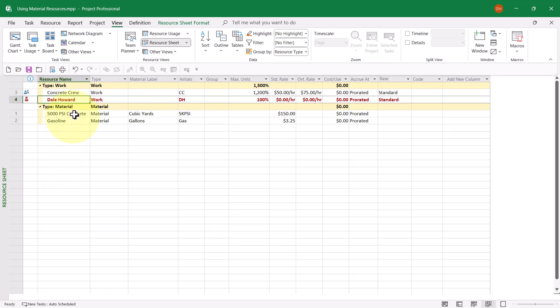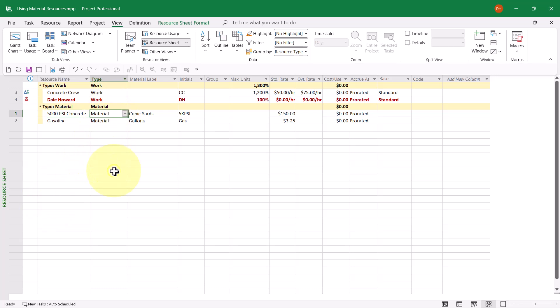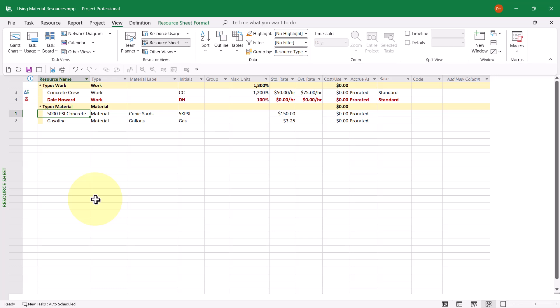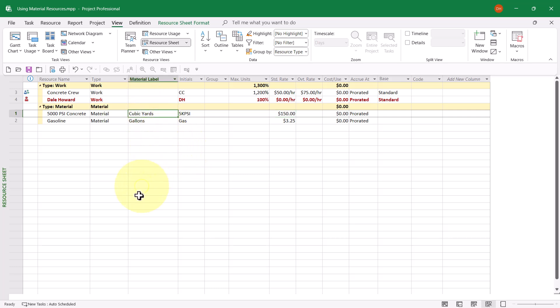Here's where it gets interesting. I have two material resources in this project. The first is 5,000 PSI Concrete. Notice the type is set to Material. Notice the Material Label value is cubic yards. In the Material Label column, this is where you enter how you measure the consumption of the material resource. Here in the United States, we measure the consumption of concrete in cubic yards. You'll also notice I put a clever little set of initials in for this resource, and I've set a standard rate at $150. That $150 means $150 per cubic yard.